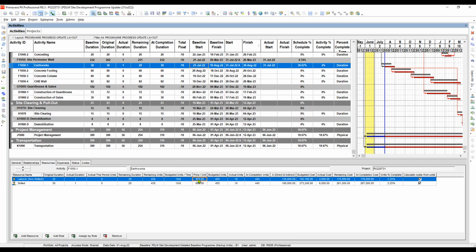As you can remember before, for our estimate to complete there should be a technique that we have to choose in calculating the estimate to complete in the earned value field. One of the techniques being used here is what we are doing now, the estimate of the remaining cost. So if we will be using this one in our earned value estimate to complete, then it's up to us. Okay.